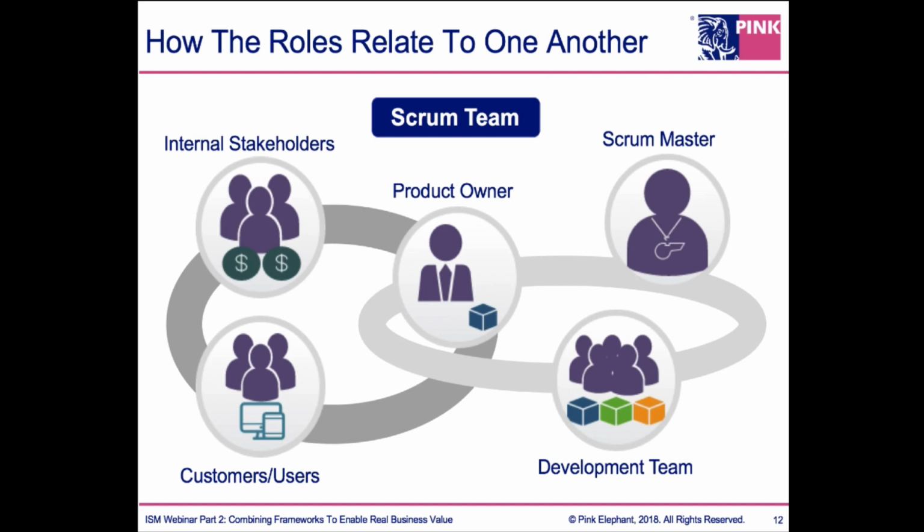It makes sure that the various roles involved in the process know their responsibilities and do those responsibilities. For example, a self-managing team will be able to self-manage its own selection about how much work it takes from the backlog. However, it doesn't take any work from the backlog. It only takes the top prioritized work, top shelf, if you will. And then what it does take and commit to get done within a given iteration or sprint has to also equal the experience that team's been able to provide over time. So it's not like I can give myself a light sprint this time, because the Scrum Master will be keeping track of the amount of work done over the previous iterations and will encourage the team to take on the full workload it's demonstrated it's capable of doing, right? So there's a voice of a conscience, if you will, the Scrum Master plays here.